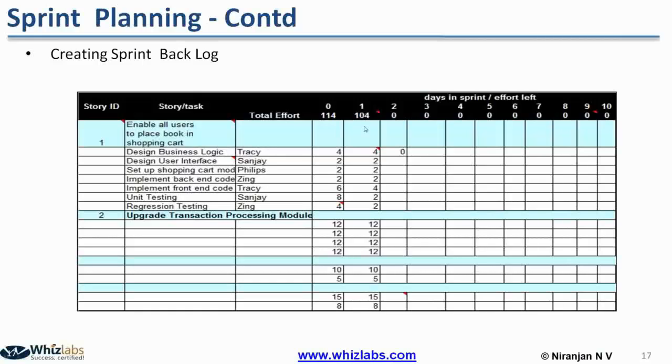Okay, and as the team starts working every day, the team members will spend some effort, and at the end of every day, every team member has to update against his or her task: what is the total number of hours remaining to be completed? So we have to be careful. We should not capture how many hours completed. We should capture how many hours remaining to be completed.